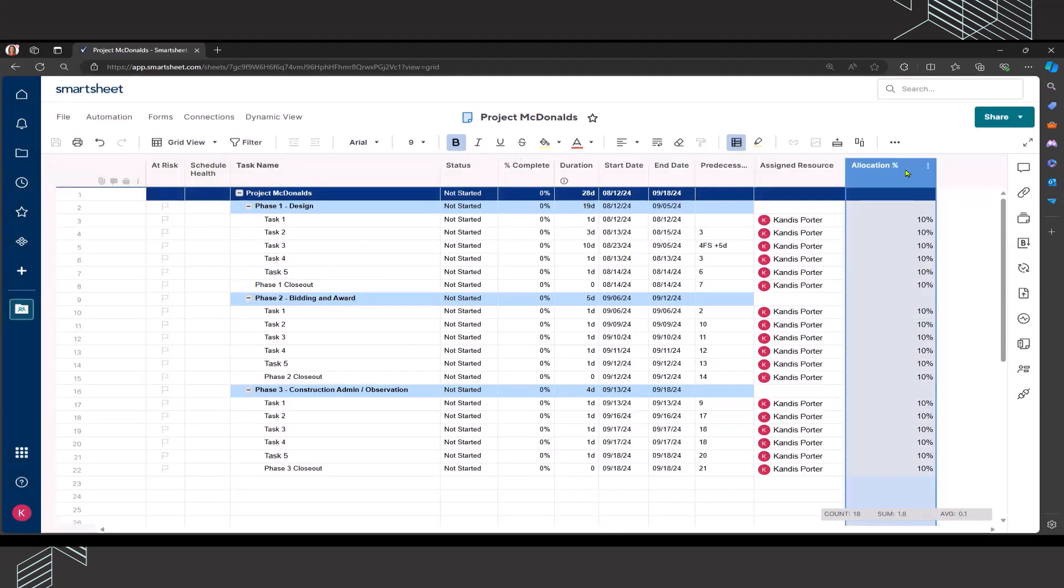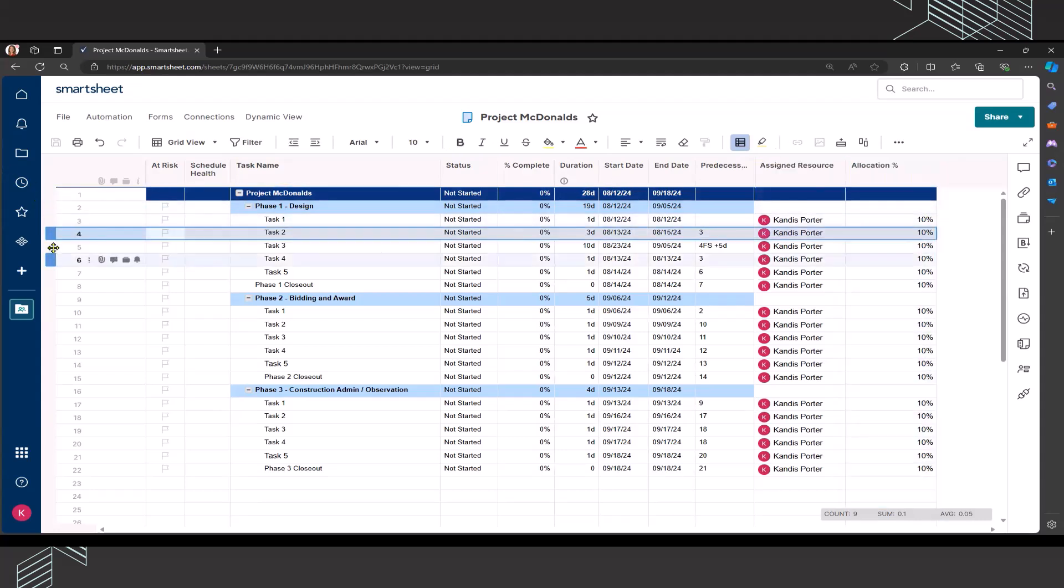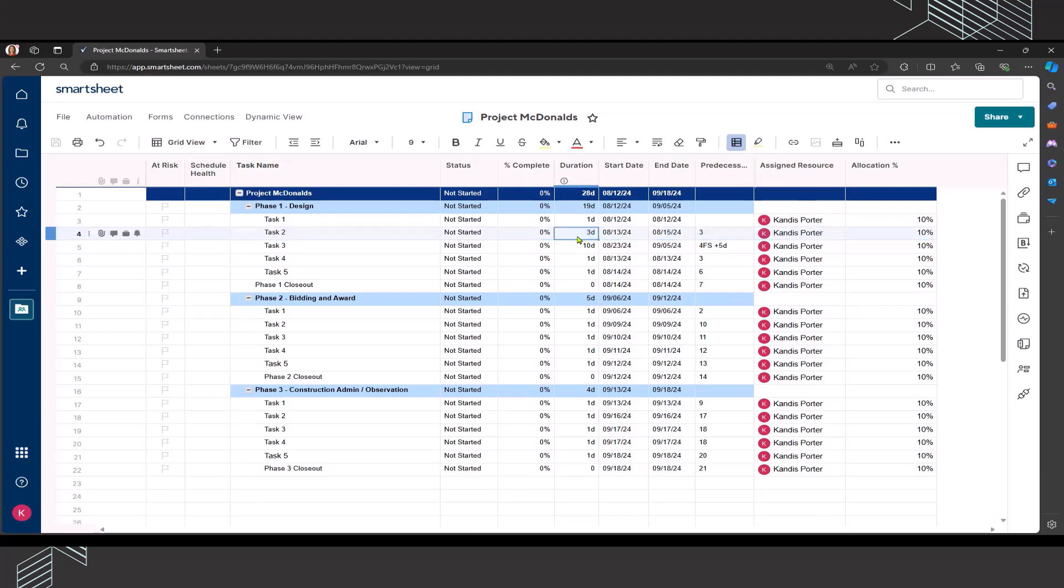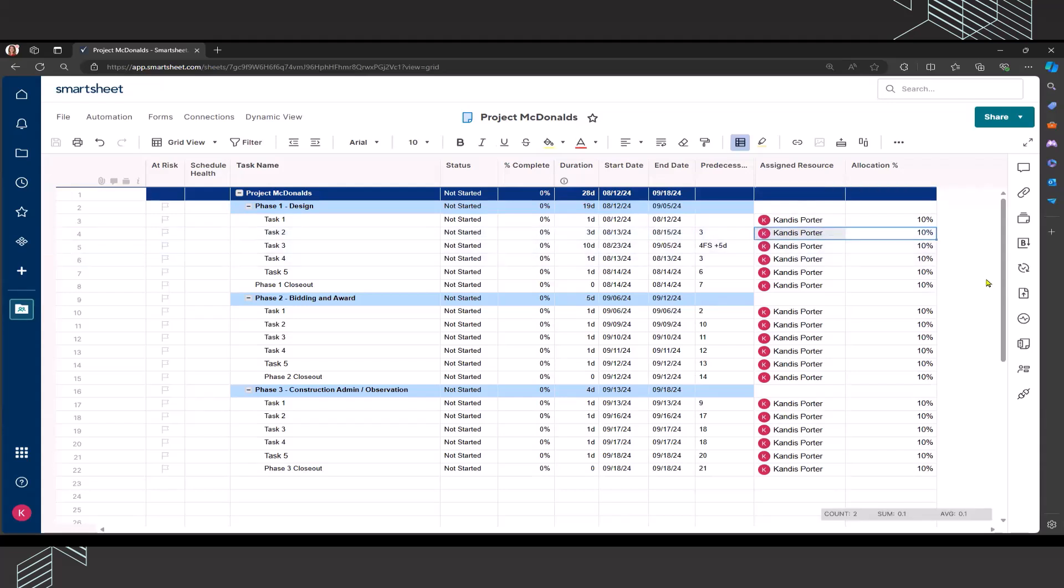If you have not worked with allocation percentage before, I want to explain the purpose of that. What that means is the time of the resource that is assigned to that particular task. For example, if we look at row four here, task two under phase one, this indicates that this task is going to take three working days and it's going to start on 8/13 and end on 8/15. That means that if I am assigned at 10% over those three days, and we're talking about eight hour working days, that would mean over those three days, there's a total of 24 working hours. If I'm only assigned at 10%, I expect to complete that task in 2.4 hours.